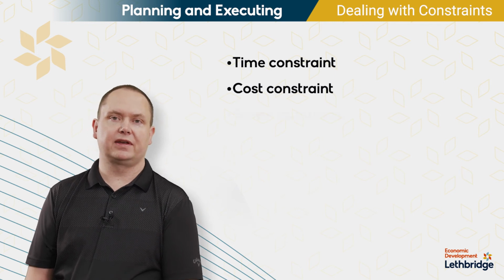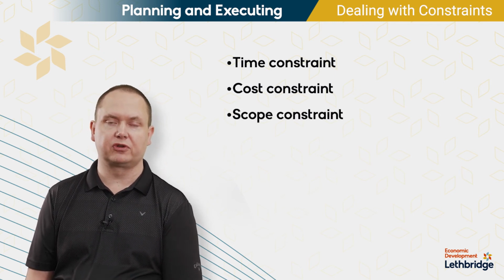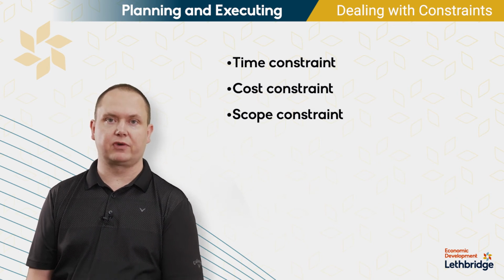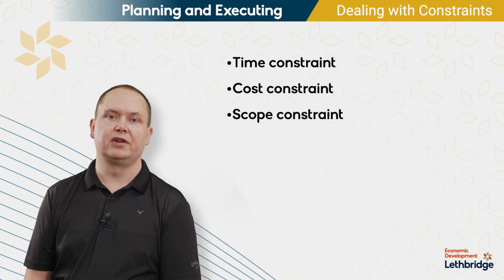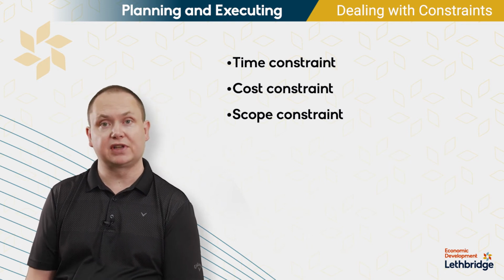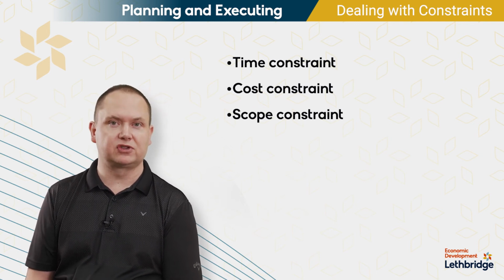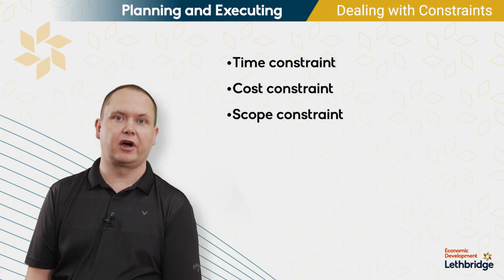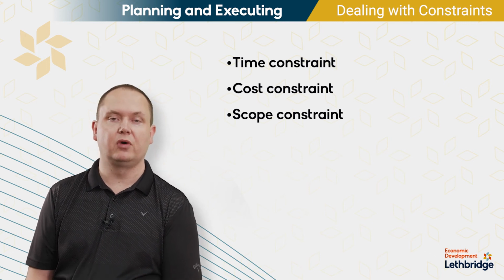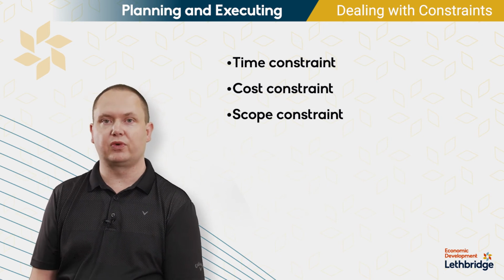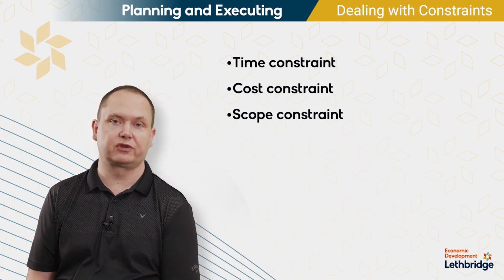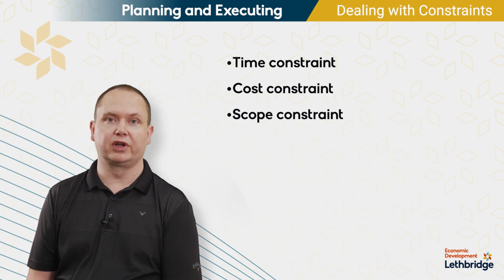When everything is focused on the scope, so no matter what, your scope has to come in. You have to deliver exactly what you've identified as your scope. Then you can always increase time or you can increase your costs by throwing more resources at it. But there again, it's important to have identified early on what is your priority number one, what is your priority number two, and so forth, so that you can choose which one of those two, time or cost, if you're looking after scope, you're going to increase.